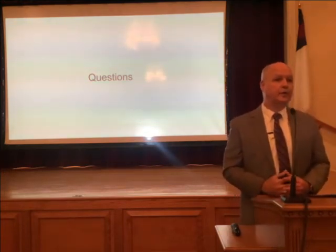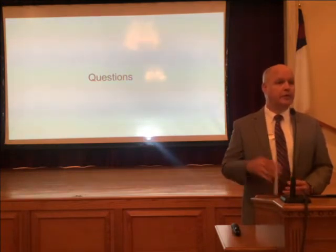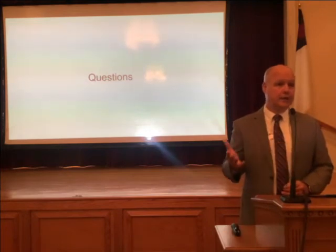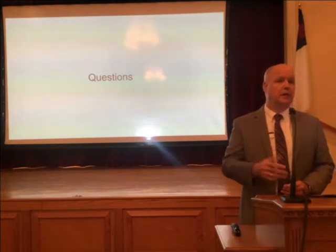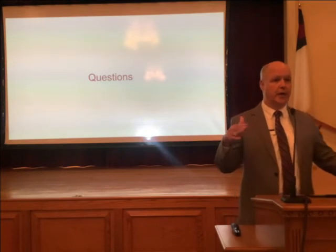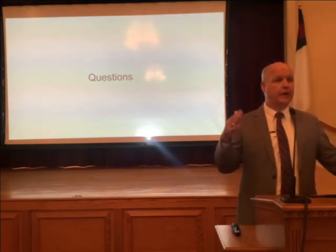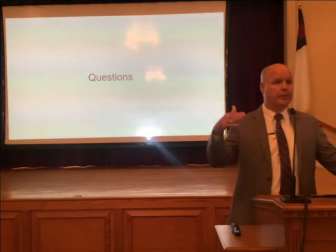So I might as well tell you and just be upfront with you. If our bids come back and they're way high, which they might be because we did these drawings 2 years ago, and a lot has changed in the cost of things and contractors' ability just to charge whatever they want, I have said to the person that's doing the bidding for us, please arrange your RFP in such a way that we're telling the contractor ahead of time what our VE, or value engineering, process will be, so that they can be warned, number one, that some of this work may or may not be in play, but two, we can quickly identify things we need to take out.